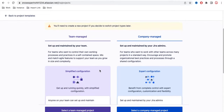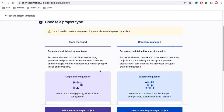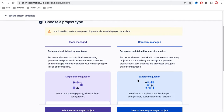Let's understand through a simple definition. The difference between team managed and company managed is: if you are new to Jira, don't have a Jira administrator, and have a small team wanting to manage stories, epics, and bugs, you should go for the team managed project. But if you have a big team, need more control, want more customization, and want to create more complex workflows, you should go for the company managed project — and there should be a dedicated Jira admin with experience.